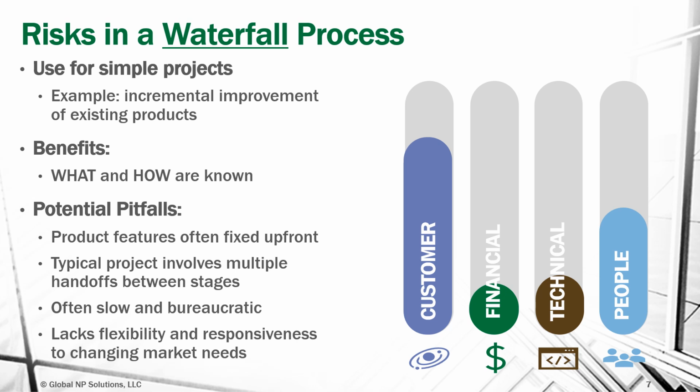And the typical project also involves handoffs between stages. In that case, then, our people risk is medium because we can have missed information or having to do rework between those different stages. And we all have heard the bad things about waterfall processes. They are considered slow and bureaucratic, lack flexibility, and indeed can lack responsiveness to changing market needs.